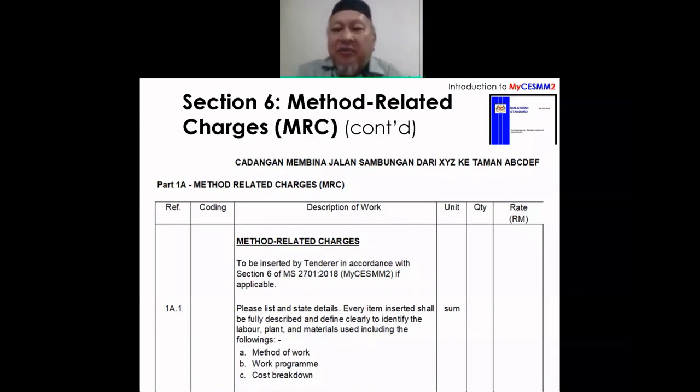The contractor sees that when this entrepreneur put up a batching plant, he wants to sell not only to this project, but also to whoever wants to order from him. He's a businessman, so it doesn't matter to him. Whoever wants to order, can order. So the contractor, seeing the batching plant already set up, goes to the entrepreneur and strikes a commercial deal, a first right of refusal, where the entrepreneur supplies him alone. The commercial rate is also favorable. So finally, the contractor never set up a batching plant whatsoever on site.